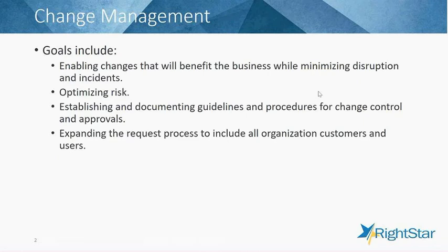And it's also not to just minimize the risk. We want to optimize the risk, meaning that there may be some changes that are requested or that are required that may carry relatively high levels of risk, maybe 30%, say, for example. But if the potential benefit is 70%, then in that case, we want to be making an informed decision to understand that the rewards may outweigh the risks in that situation.